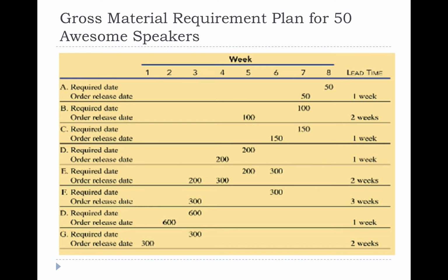If you keep it in parallel with the time phase product structure, you would realize it is talking in a little more detail. If you go to the horizontal axis on the top, you would realize that it is speaking of weeks, and the time phase product structure was also talking of weeks. So this is week number 1, week number 2, week number 3, till 8 weeks, because it would require 8 weeks for the completion of this product.